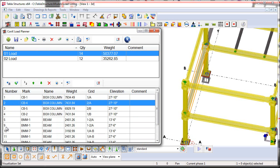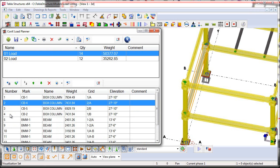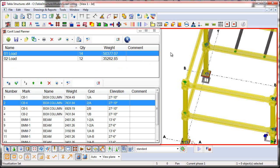Now depending on where the shop is already at in fabrication, you may not want to renumber these items, and you may just want to tell them that they're deleted, and then there will be a hole in the gaps. Alright, so we're then just going to save that once we've made those changes and cleared the modification states, and we're pretty much done with doing the initial load listing as well as dealing with the revision.